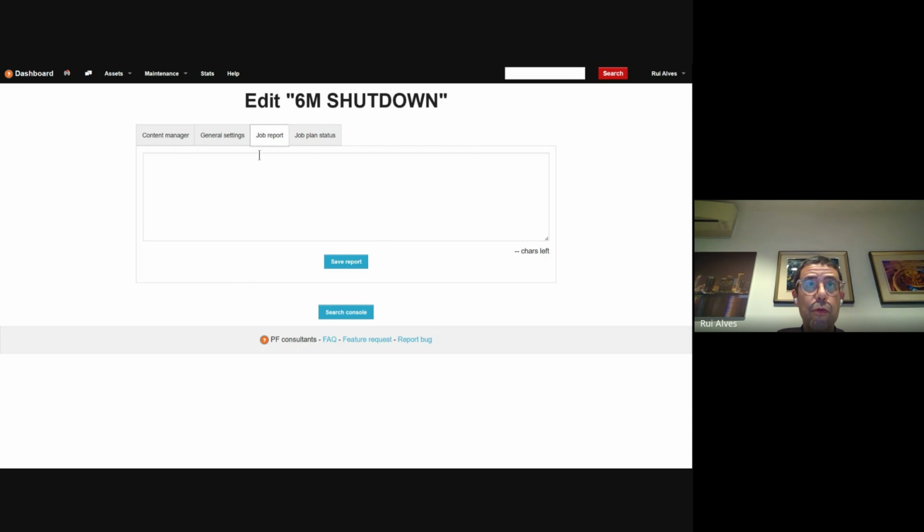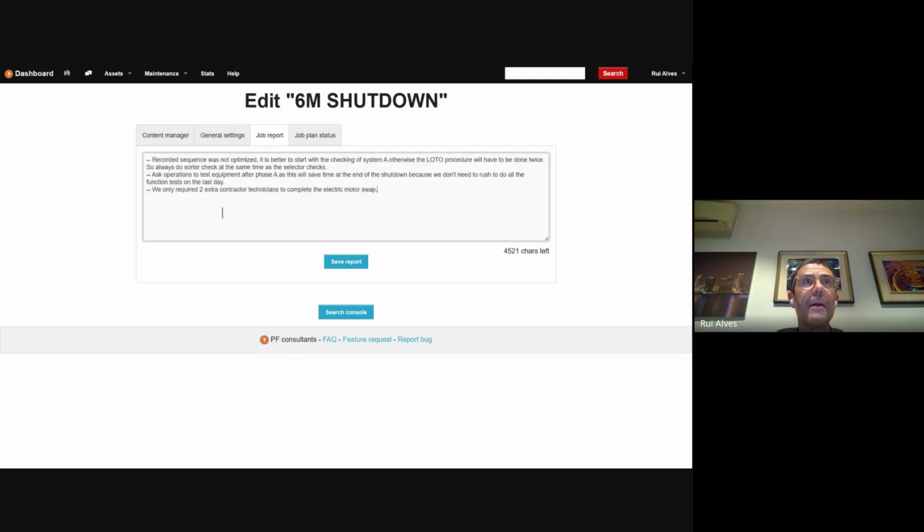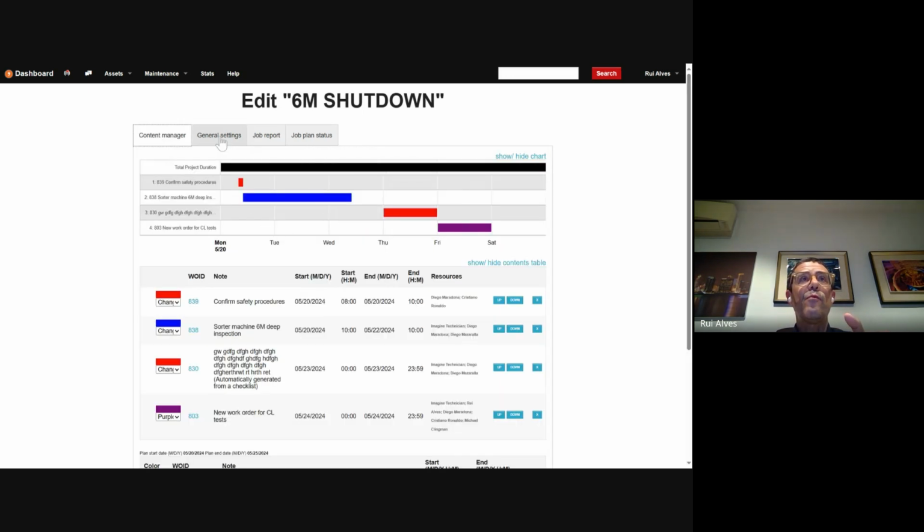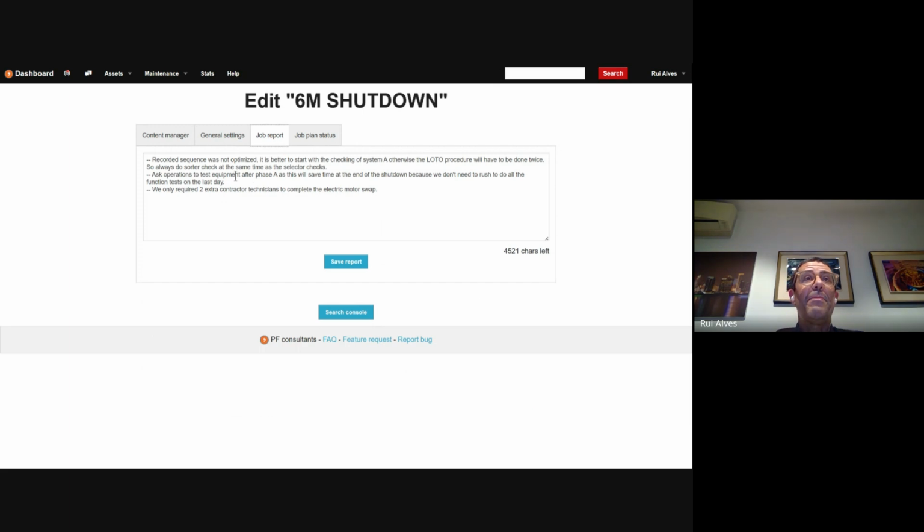So you use this space, the job report. Again, it's the report for the aggregate of all the work that you have done. I have something written in here already that I'm going to copy and paste. These are just examples of things that you can write. So, recorded sequence was not optimized. The recorded sequence is this sequence of work. Recorded means that it's what happened. It was not optimized, and it is better to start with the checking of system A, just as an example. Otherwise, the lockout logout procedure will have to be done twice.